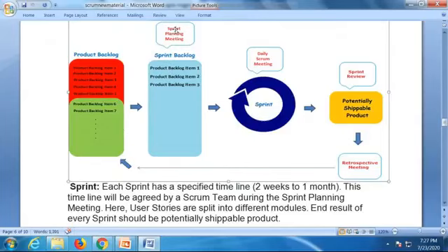The first meeting we conduct in Scrum is the sprint planning meeting. Who is responsible? I'll tell you. In this planning meeting, we collect the requirements from the product backlog. We convert that first priority into the first sprint. Backlog means what? Collection. I mean items: item 1, item 2, item 3. Item means nothing but modules here.